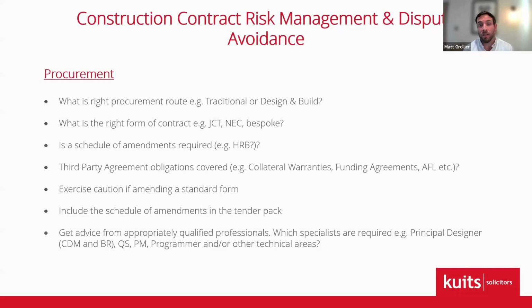For example, is adverse ground or site conditions something that needs to be catered for, or are we dealing with a higher risk building, and we need to consider the additional duties and requirements as regards recent building safety legislation. Schedules of amendments are also used because they're often expected by and needed to cater for the requirements of interested third parties to the project. So future tenants, funders, future purchasers.